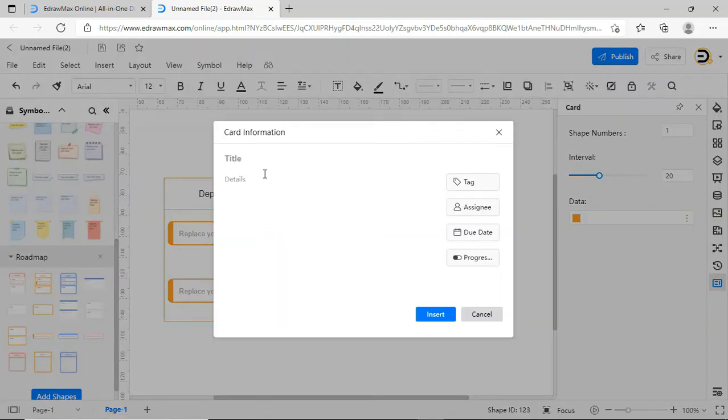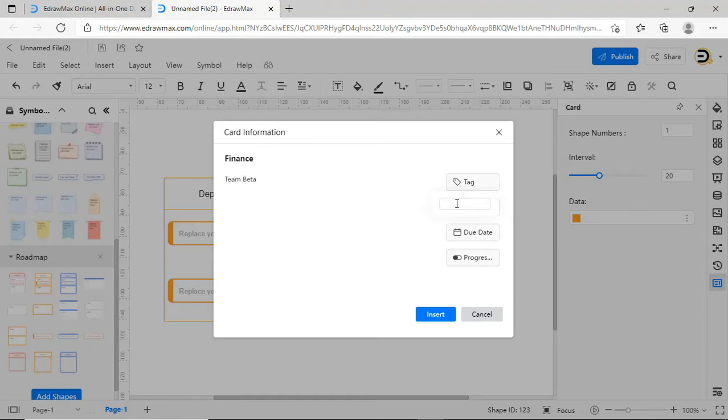You can directly drag the card symbols from the Symbol Library on the left into the Roadmap as needed. The card symbols allow you to input specific items such as title, Detailed Content, Label, Person in Charge, Deadline and Current Progress as shown.